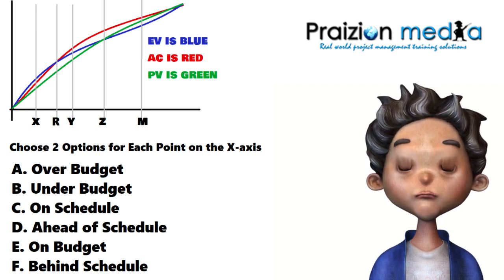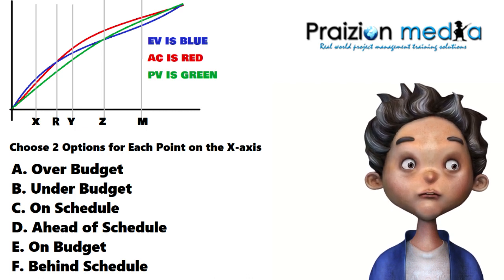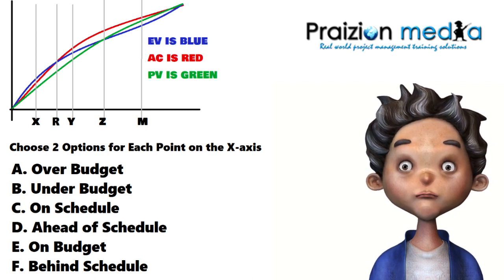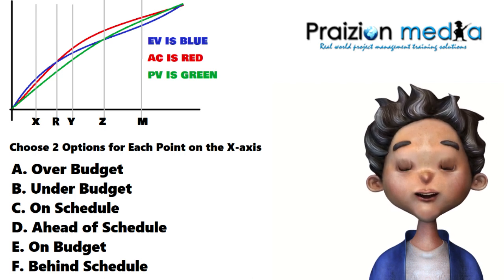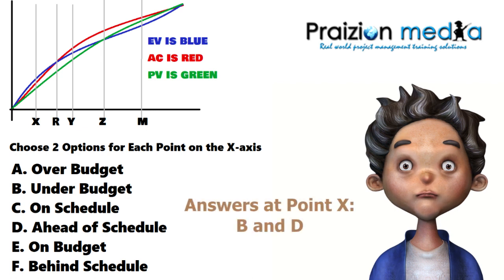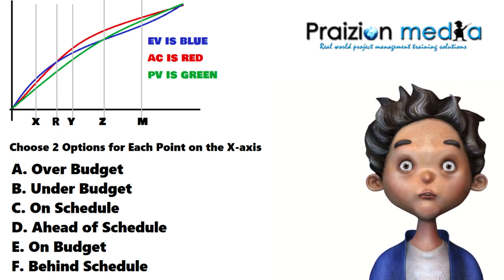Let's talk about our next question here — point X. At point X, you can see that the earned value line is above both the actual cost line and the planned value line. So earned value is in a favorable position. For that reason, we choose both of the favorable options: you're under budget and you're ahead of schedule. I'm hoping you chose option B and option D — under budget and ahead of schedule — for point X.